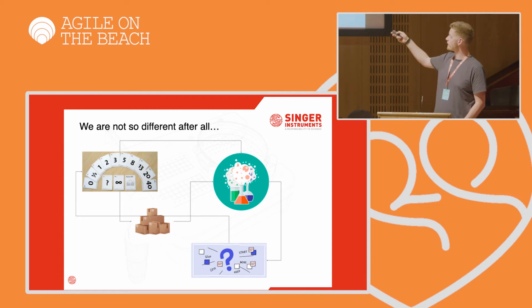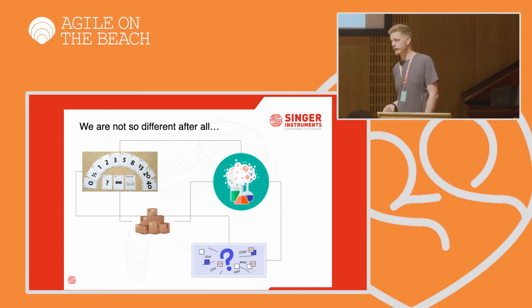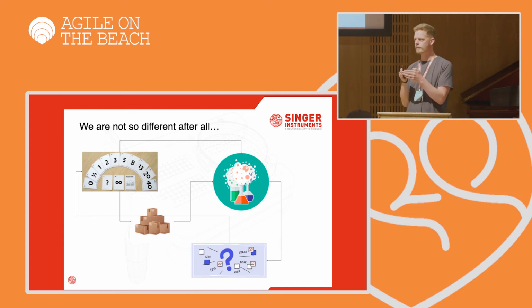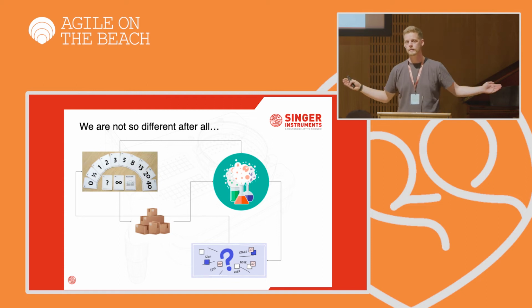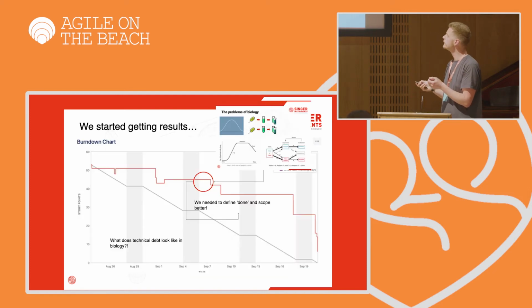That would all be fed into an experiment or thrown into a big old backlog. We'd spend 4 weeks chugging along on it. And at the end, we'd have a retrospective of what went well, what didn't. We'd change it all up and move things around. More recently, we've come to a very targeted sprint scrum team as well. We used to have a much bigger team with all server support and quality. But we've really found that communication on what we're currently working on is vital. So we do a lot of that as well. So not so different to all the stuff you're going to be used to.